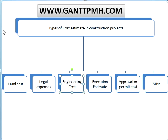Third is engineering cost. Engineering cost consists of planning — architectural planning, structural design, MEP design — and there would be many other designs such as landscape design and others, along with the estimate of the execution cost. The consultants or experts who do technical compliance on site are also included in engineering cost, which is separate from the execution estimate.